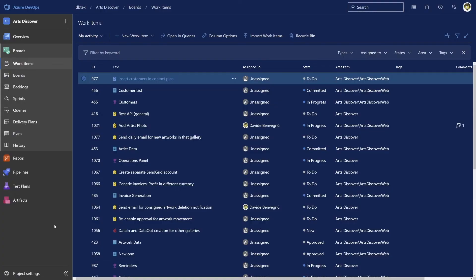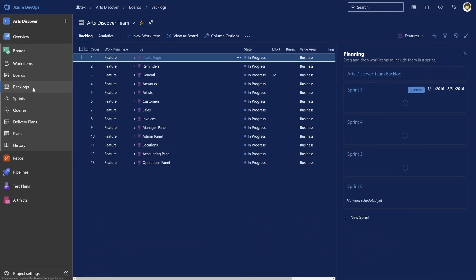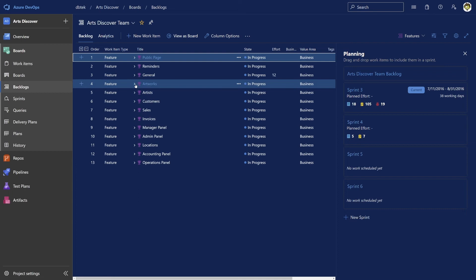So let's say for example you want to create a new task to assign to a developer. That task will most likely be related to a product backlog item, which in turn will be related to a feature. In a scenario like this, what you probably want to do is go to the backlogs tab, locate and expand the feature and the backlog item your new task will be part of.